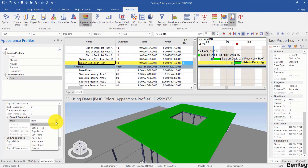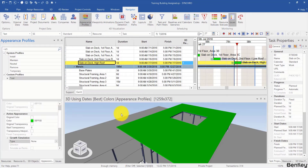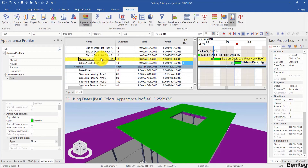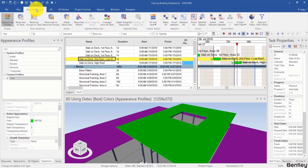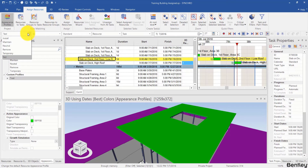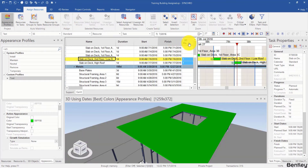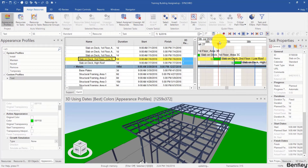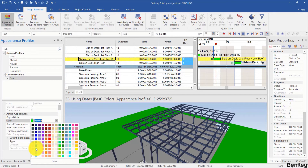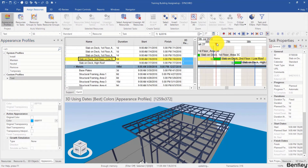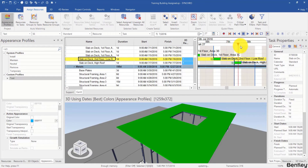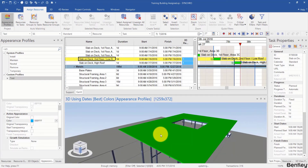All these details we will customize later. Now we're going to assign the resource low roof to the task 'second floor low roof'. Make sure you use the profile 'test' before you assign it — you can confirm this from the drop-down list or by clicking on 'test' in the Appearance Profiles panel. I hit Assign Resources and now it's assigned. When I drag my focus time, it's green when the task is active. I go back to the active appearance and make it blue, and now when the focus time is during the task, the color is blue.